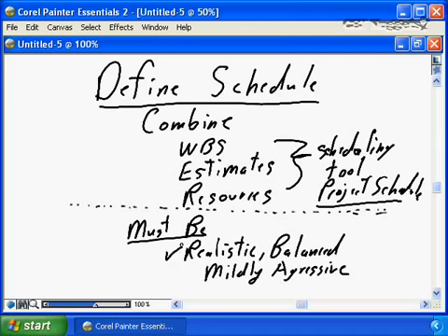We believe, based on all the information we have at hand, that the WBS is complete, that it is not over complete. We have not padded it with extra effort, but it is the actual WBS that is required to satisfy our project scope. It is well balanced. A well-balanced project is where the resources are fully utilized. Once a team member joins your project, they are on the project for the appropriate duration, running at full utilization.